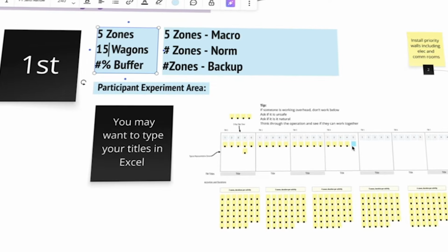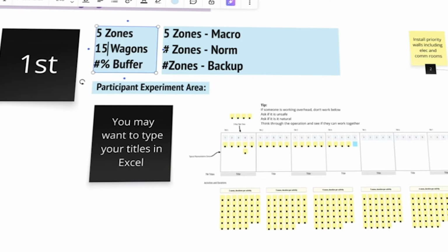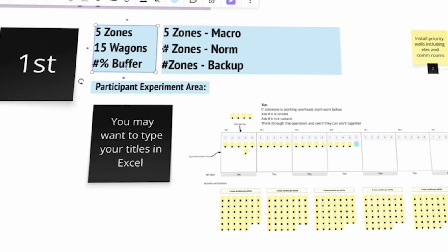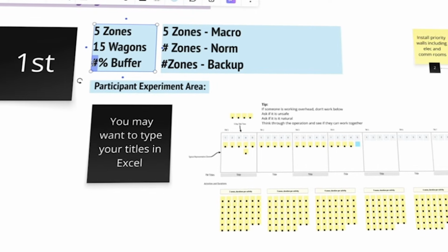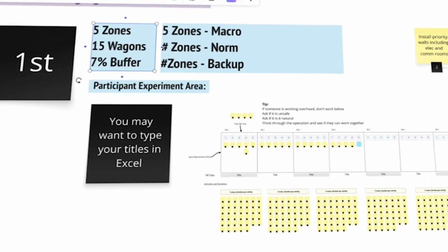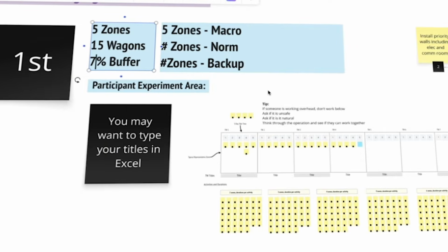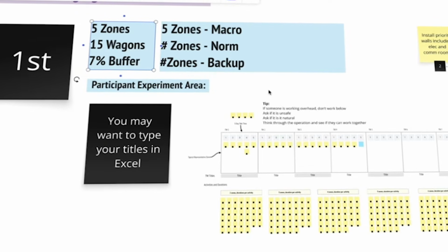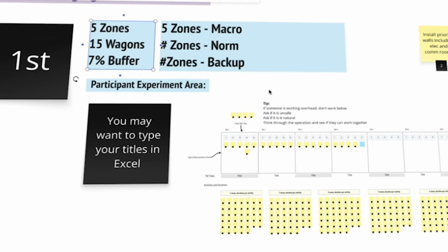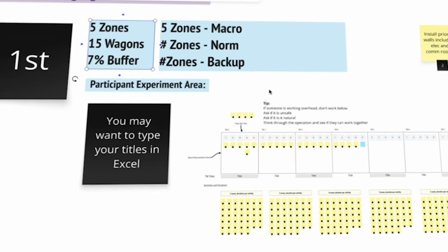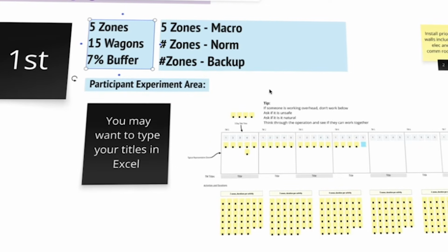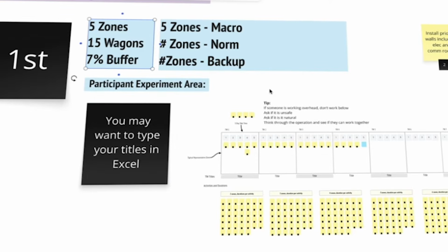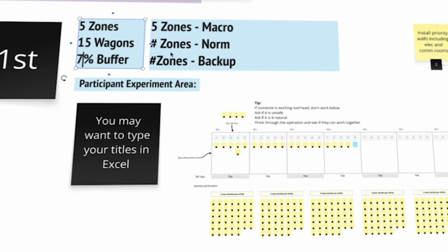And then when you're done with the sequence, count how many buffers we have throughout, divide it by the overall total, and give me a percentage. If you ended up with 7% buffers, that's between the 5 and 20 range. That's well researched from research papers, okay? If you're less than 5, you're probably too aggressive. If you're over 20, that's too conservative. So you want to make sure that this data is tracking.